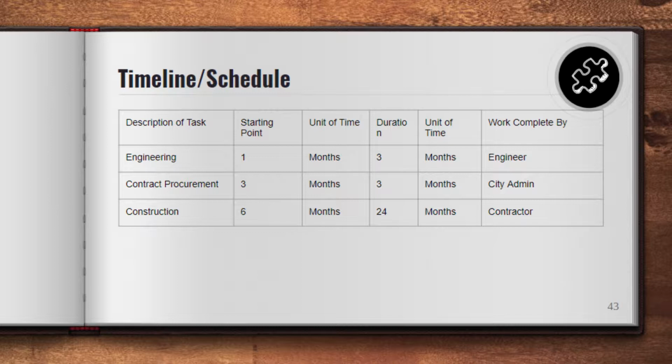All right, so timeline and schedule. When you get to this in eGrants, it asks, what is your timeline and your schedule? There's a narrative that goes with this. When you answer that question, how it's going to happen and when, that's where you say, well, we know it'll take 12 months of construction, it'll depend on when you give us the grant, and we can only do construction in the summer. Write your narrative out, but make it simple. You don't have to outline every single thing you're going to do.